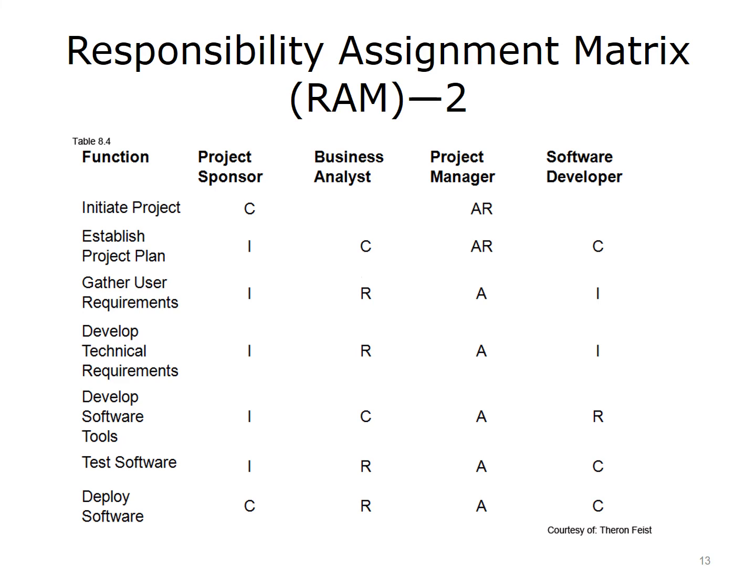In this grid, R equates to responsible, those who do the work to complete the task. Usually, one role is assigned as responsible, although other roles can assist in carrying out the task. A equates to accountable, those who are ultimately accountable for the correct and thorough completion of the deliverable or task, and the one to whom responsible is accountable. In other words, an accountable must sign off or approve on work that the responsible party delivers. Only one role can be assigned as accountable for each job or product.